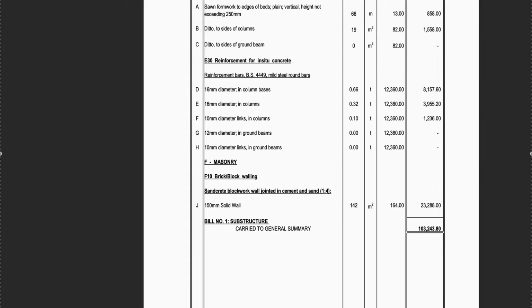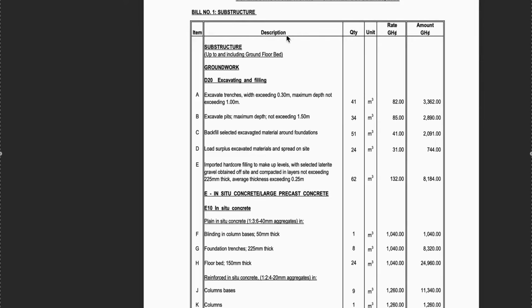Here is how a standard bill of quantity would look like. It has sections and line items for each task or activity which will be performed. There are columns that tell you the description, the quantity, how much work will be done, the unit, and then the rate is also given. This allows for a standard way to compare one contractor to another. It is contractually binding.